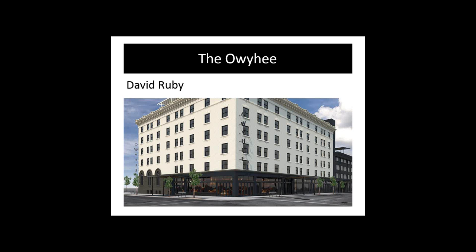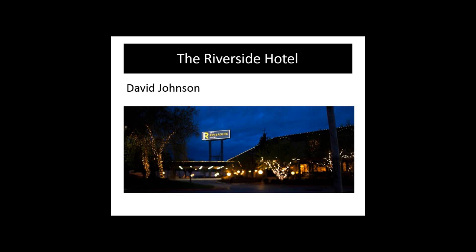But we're going to be long-term owners, very long-term owners. So it was important to work with the Integrated Design Lab and Idaho Power and the other members of the team to come up with a good long-term plan by coming up with staged projects that we can do over time as budgets allow. When we first got into the project, we had a business plan that went in the trash in like the first day because we had to just focus on other things.